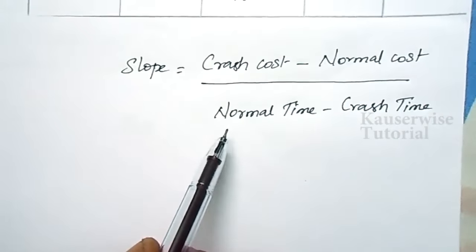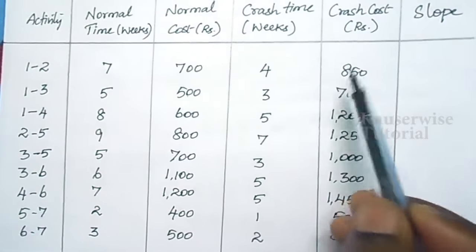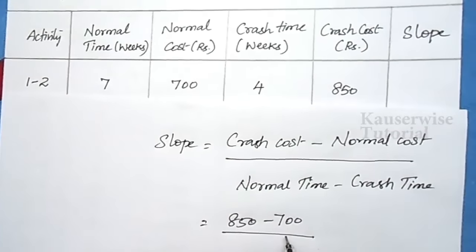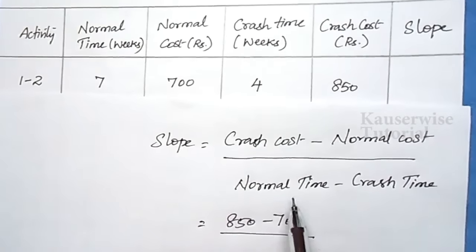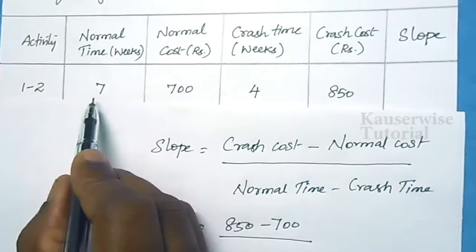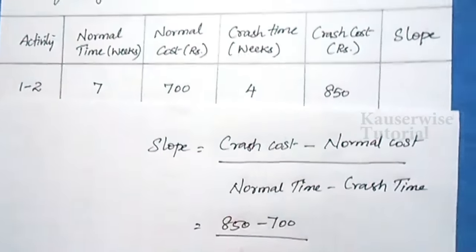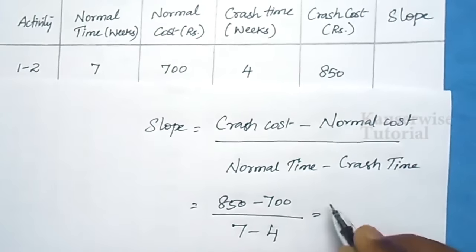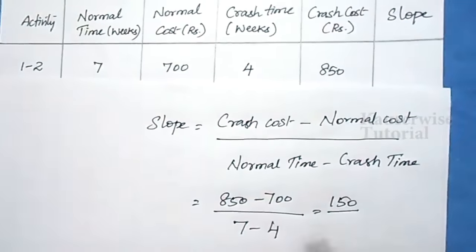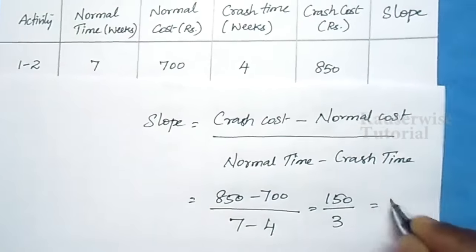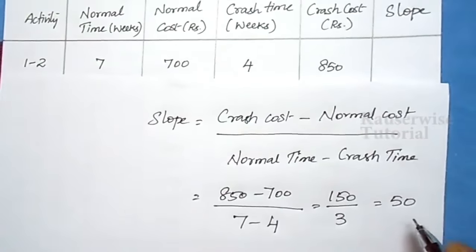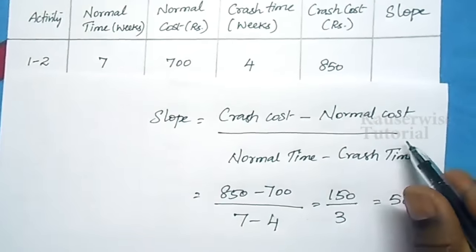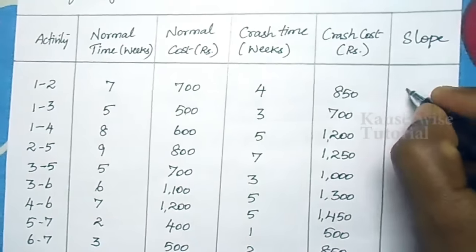For the first activity, crash cost is 850 and normal cost is 700. Normal time is 7 weeks and crash time is 4 weeks. So slope = (850 minus 700) divided by (7 minus 4) = 150 divided by 3 = 50. This is the slope. Apply this formula to find the slope for each activity. For the first activity, slope is 50; for the second activity, 100; and so on up to 350 for the others.